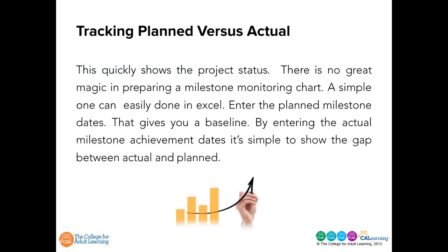There's no magic in preparing a milestone monitoring task. A simple one can easily be done in Excel. Enter the planned milestone dates. That gives you the baseline. By entering the actual milestone achievement dates, it's simple to show the gap between actual and what was planned.